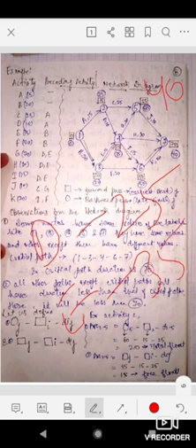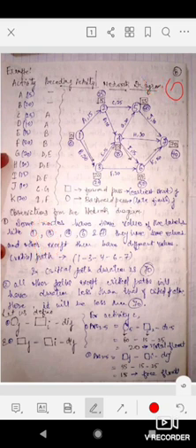So how can we move forward without completing both these activities, D and E? At node 4 we will be free only after 35 days, because from 25 to 35 we were busy doing activity E. Any activity can only be started after completing both D and E. So at node 4 we can move forward only after both activities are completed, and that will be after 35 days. That's why in this square I have written 35, not 25. So keep in mind, when we move forward, we will take the maximum of those 2 or 3 activities.